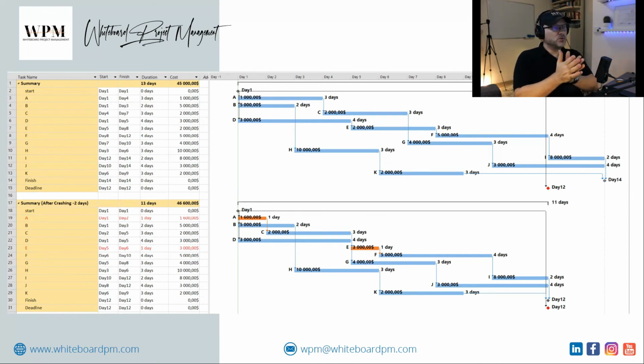Because you could be working on a site, and due to some requirements, another contractor needs to start his activity, but you need to finish yours. So you said, I have my cost baseline to finish in 14 days. So the client gives you a change order: okay, decrease your time schedule to make it 12 days, make crashing, submit to me the change order, and I will approve it.